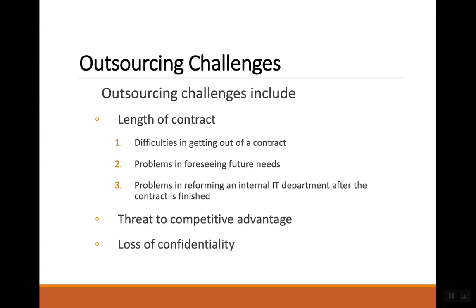Not every outsourcing contract has gone as expected. So you've got things like the length of the contract, getting in and out of the contract, identifying all the different projected activities. A lot of times organizations will think they've got their arms around the scope of something and discover much to their horror, after the contract is in effect, that instead of being a lower cost, it actually becomes a higher cost.